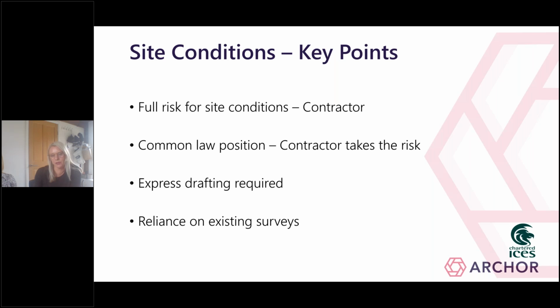So to summarise, whilst the NEC contract in its unamended form is very clear on how the risk for site conditions is to be shared, the contract is generally amended in a way that makes the contractor fully responsible for the existing conditions of the site. The definition of what amounts to a site condition is itself often very wide, so this can be a very high risk amendment for the contractor, and it's one that's often the subject of negotiation.